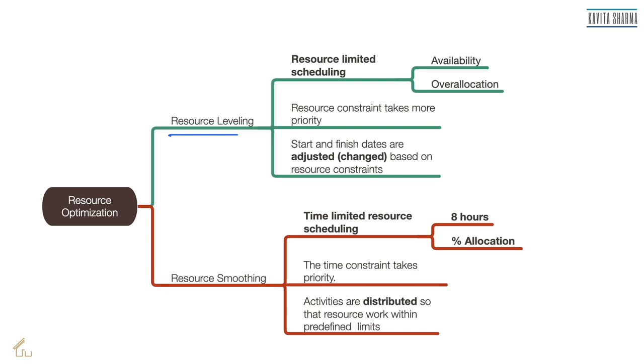Now, when do I use resource leveling? There are times when the resources are available in limited quantity, or they are over allocated, or they are not even available. So resource leveling is resource limited scheduling. To give you a very simple example, I would have customer calls over video calls with a limited resource, which is a video call room or war room, which has video setup enabled.